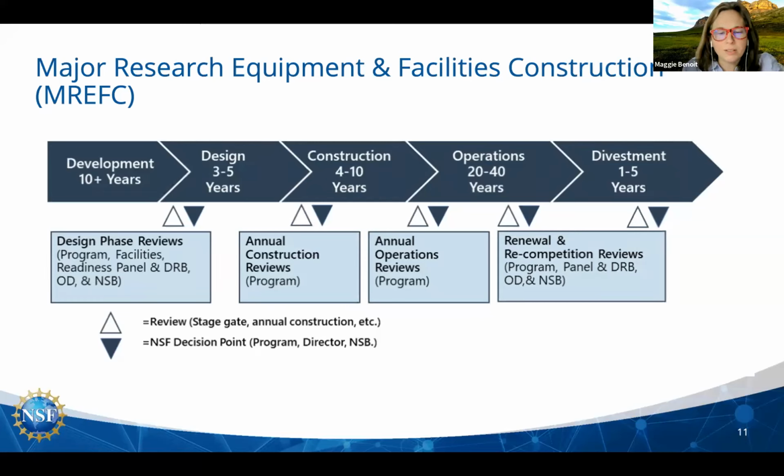The development process is probably the most difficult process after divestment, and it can be very lengthy. In order to enter the formal MREFC design phase, going from the development phase to the design phase, there has to be significant consensus building across the NSF. So you have to have buy-in across the divisions, the directorate, and through the director's office.